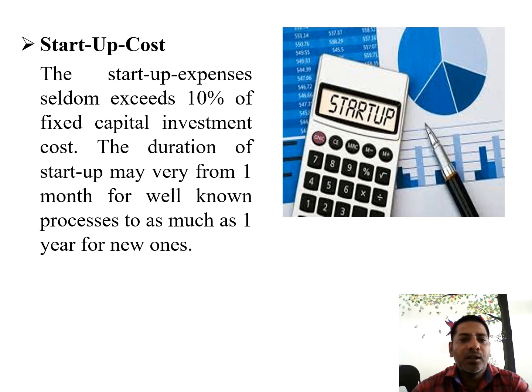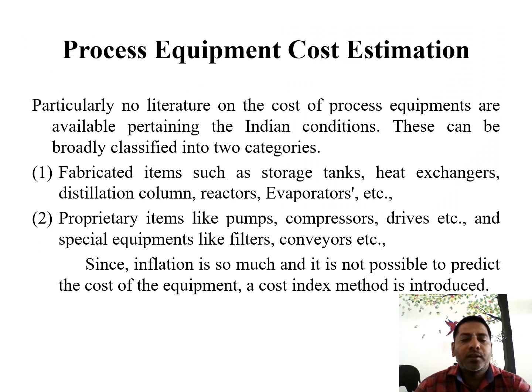Next, we see the startup cost. Startup expenses seldom exceed 10% of the fixed capital investment cost. The duration of the startup may vary from 1 month for a well-known process to as much as 1 year for new ones. Next, we see process equipment cost estimation. Particularly, there is no literature on the cost of process equipment available pertaining to Indian conditions.